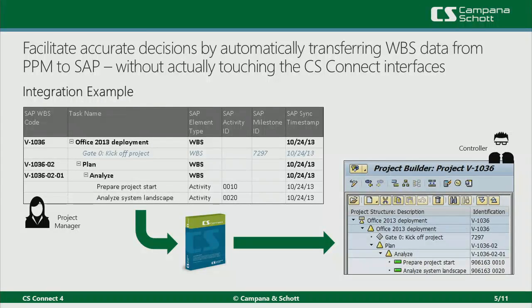Yeah, so the question is, if I'm recording my actuals in SAP, can I bring them back to Project Server? Definitely. We can do it both ways. If you do it in Project, we can send it to SAP, to CATS. And if it's in CATS, we can send it back to Project. The only key thing is we need to agree with each other on what level it is captured, because if you capture it on this WBS level, we need to push it back to that level. But that's really, the challenge is more aligning the process properly. The technical things are all in place.